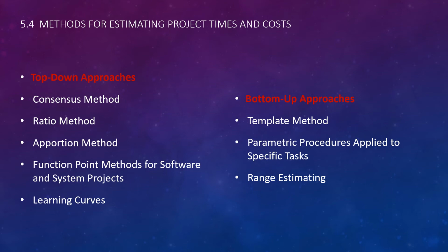So simply, we have a lot of experience. As we get better, we feel like our cost on this kind of thing is going to go down. Or the company that we're using, as they get better, they may not need as many hours to do certain tasks because they've done them repetitively over again and they've learned our systems. So as that learning curve comes, we're going to ask for reduced cost or time on certain activities to keep our costs down.